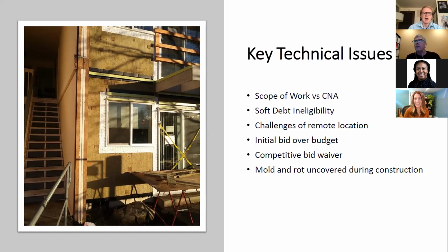So going into it with that full scope of work with the interior was what we needed to get it closed. One of the technical challenges we ran into was the soft debt ineligibility. That's the way Department of Commerce grants are awarded. I think Dave and Isabel brought this up as well. Thankfully, Department of Commerce and HTF were able to adjust the nature of their award to make it hard debt, able to bring out that language and get it into that funding stack.